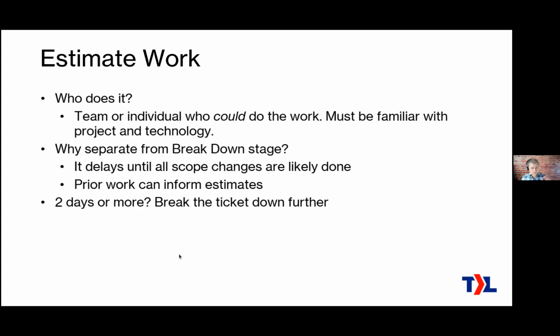And again, if you do these estimates and then you find out, oh, this ends up being more than 2 days of work now that I look at it more closely, then you've got to break down that ticket further.